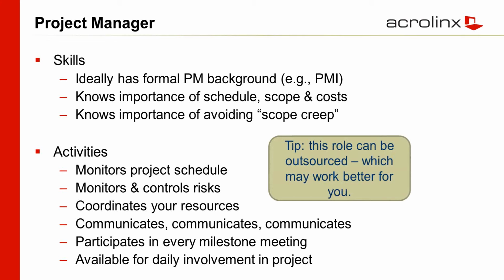Now, the project manager is someone within your organization who ideally has a formal background, may have certification in something like PMI, but at the very least knows through experience the importance of schedule, scope, and costs. Those are the things that a project manager has to be cognizant of, and also knows why it's critical to avoid scope creep. I assume everyone here knows what scope creep is, but in case you don't, it's how a project during implementation tends to expand in its scope, expand that is in expectations, and that can have a big impact on both cost and time.